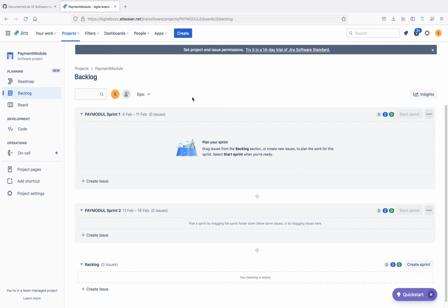Then, for example, you are developing this retail one. In that case the third module will be adding products and all, so the product management module will be in the third sprint. In this way you have to identify which modules you are going to cover in which sprint, and then in each sprint you create tasks for each functionality and assign them to multiple developers. So according to the dependency, can we have parallel sprints as well as one by one sprints? No, sprints will not be parallel. They will be one by one only.